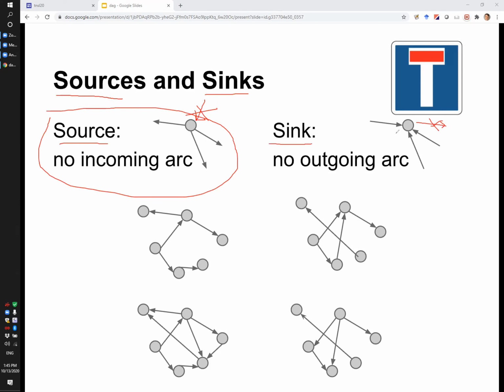For the source, there is no incoming edge, only outgoing edges. And since we haven't assigned any numbers at all yet, why not assign number 1 to the source? It's no harm, right? All these other nodes that we will be assigning numbers later, maybe 6, maybe 5, maybe even 2, they will have larger numbers than the source. And that's okay, because we will never have an arrow pointing to the source, pointing to 1. So we will never violate the property of the topological numbering. So yes, as was correctly said in chat, it's perfectly safe to assign number 1 to the source.